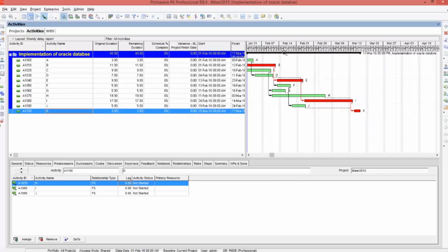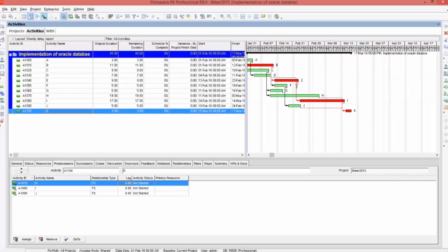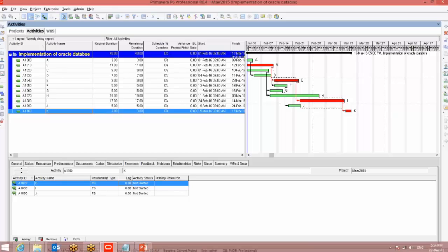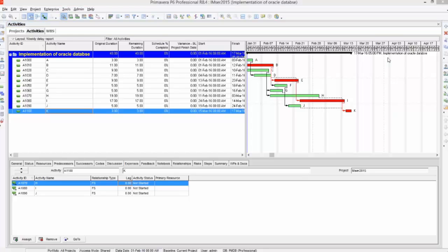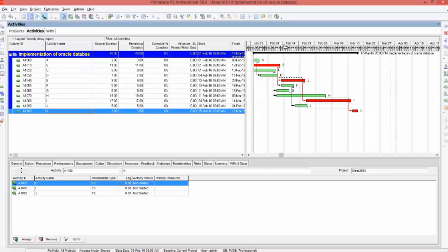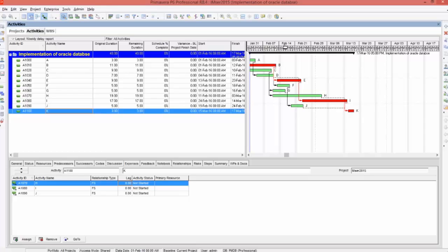Okay, right. Now here you can see which are the critical activities. These red color activities are critical. It is showing exactly as per our calculation, which is B, E, I and K. So hope you understood that how the program is calculating the critical activities is exactly how we calculated manually. Is that clear? Fine. So do you understand how to give the relationships?